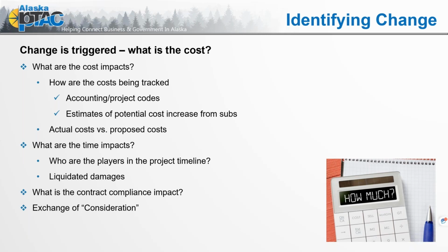Here's where this change has broadsided the contract, and now we can show the costs that were impacted. If we didn't have the change, we would have still been on target, but due to this change, we can show where those additional costs have come in. The better you can show an accounting process to verify against your proposed, against your actual, and against that change, the stronger your negotiation point will be that these are valid costs for that change.